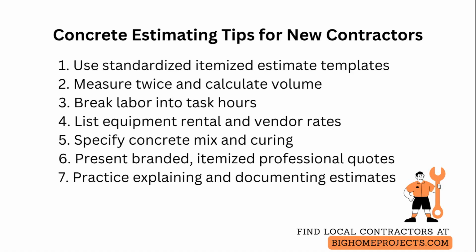Price labor by breaking tasks into hours for excavation, forming, placing reinforcement, pouring, finishing, and curing, and use realistic crew productivity rates based on similar residential jobs. If you do not have historical data, ask suppliers and local contractors for typical hours.